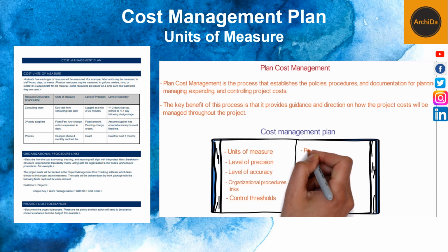Next is units of measure. To measure costs accurately, it's important to establish units of measures for your labor, material, and equipment. Some examples of measurement units can be staff hours, square feet, tons, kilograms, etc.